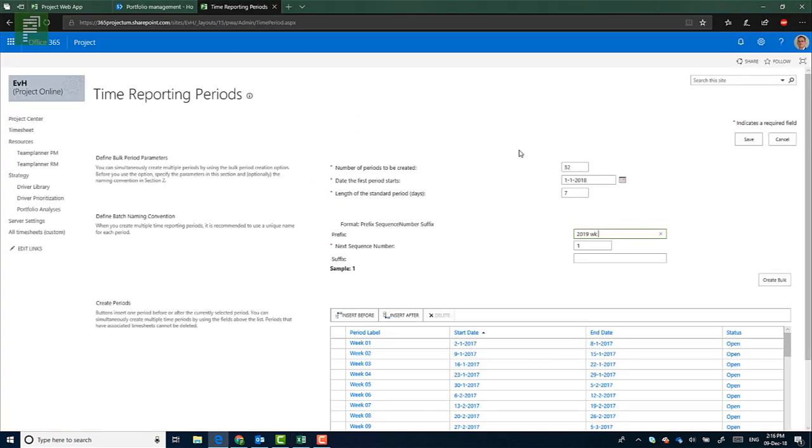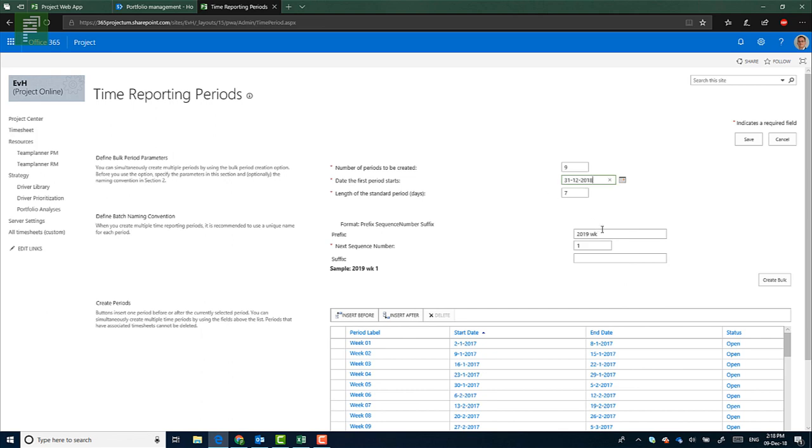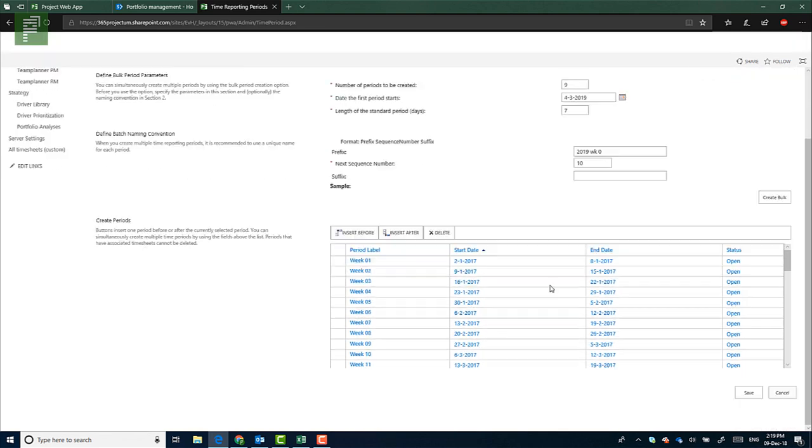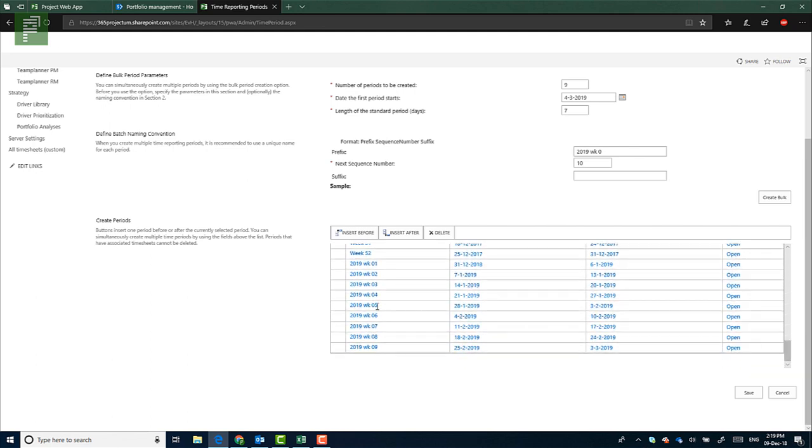Let's head back to the administrative section. Time reporting periods. What I'm actually going to do is I'm going to change the 52 to nine. I will start at the beginning of 2019. So January 2019 will start on a Tuesday, so I'll start it on the last day of the year. And I'll create 2019 WK. Now start with a zero. And the next subsequent number will be one and it will be pasted next to the zero. So I'll create nine subsequent numbers. I'll create the bulk.